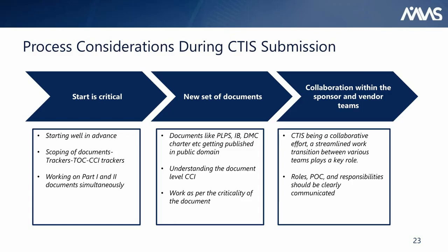And we saw in that graphic earlier, there's quite a few more documents for the CTIS submission. We rely heavily on the use of trackers surrounding the submission TOC and identified CCI, for instance. We also recommend to work simultaneously on Part 1 and 2 documents, as your timelines are very tight for CTIS and there can be overlapping needs such as translation.